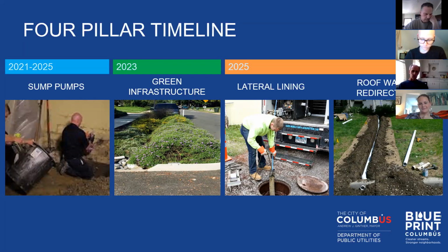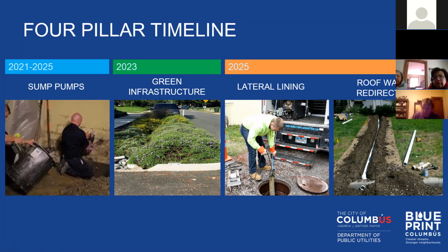The sump pumps can occur prior to the green infrastructure, though, even though they are introducing new stormwater into the gutter lines. Just by virtue of the fact that we have to achieve our goals, we have to install 185 sump pumps in the project area, which represents approximately 25% of the number of residential structures in the Fifth by Northwest area. Go ahead and advance.